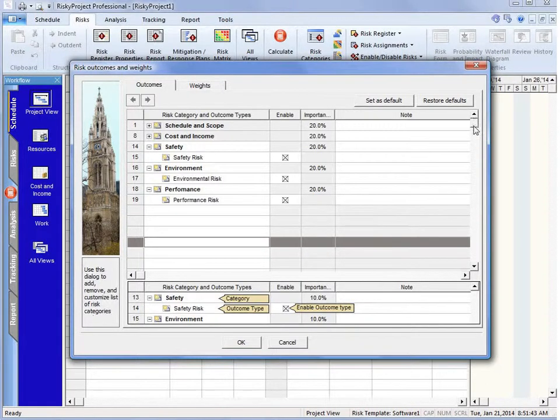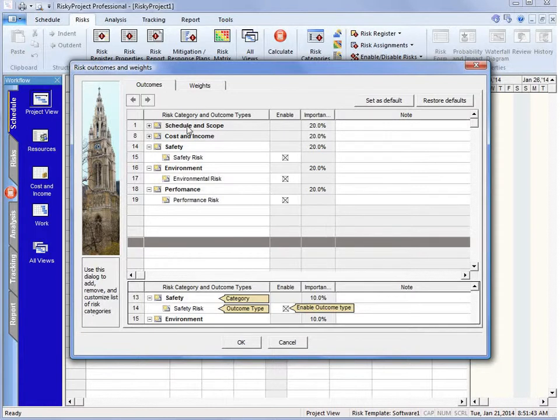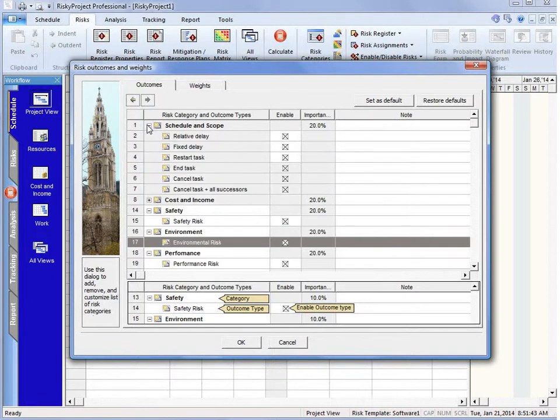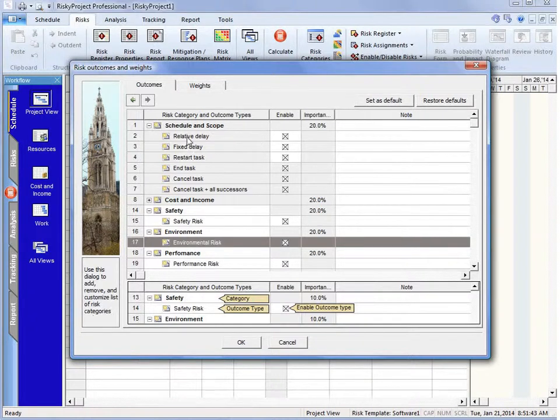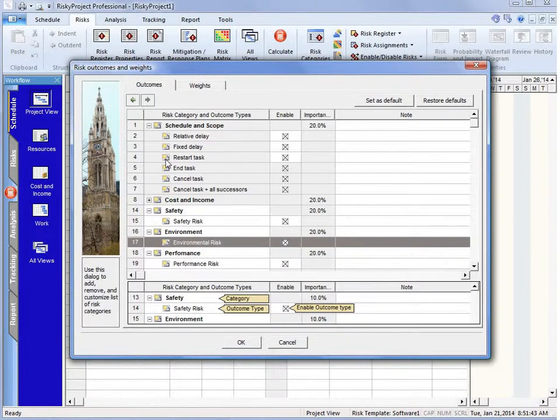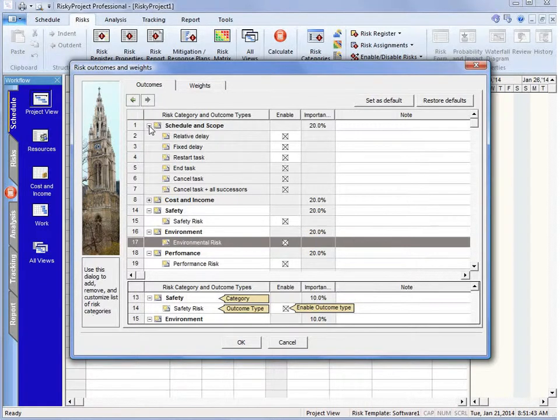And again, if we look at schedule and scope, we have the schedule or scope outcome, and it could be a relative delay or fixed delay. So these are all sorts of different types of outcome types.